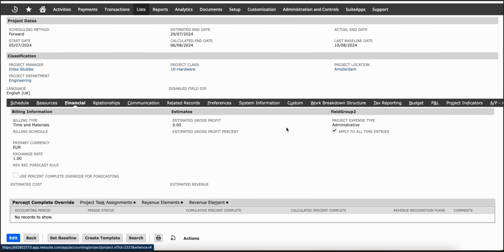But if you want to override that and say, for example, you want to use your own percentage completion, maybe the percentage completion for hours is not exactly how you would say that a project is completed. Maybe there's other factors like costing, maybe there's other factors like overrun of hours that you want to adjust the percentage of completion. You can override the percentage complete here. Of course, you would need to have access to the project record to do the overriding action, but that would allow you to actually specify. Let me just edit this job record.